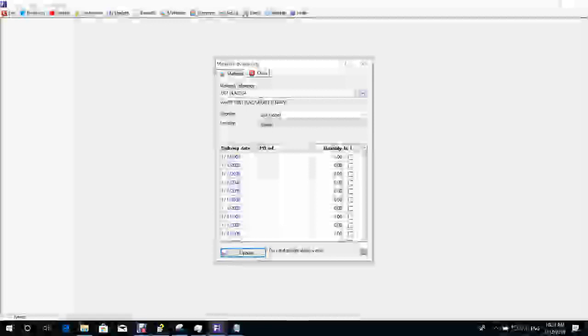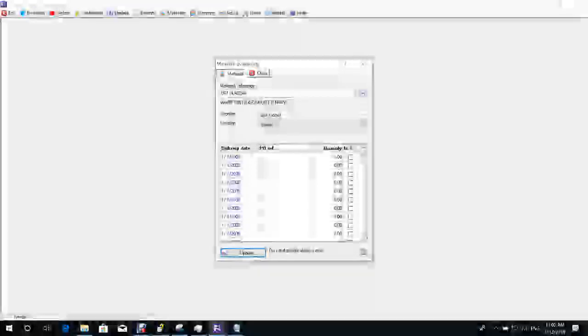Same time, yes. Because when I make a start time action plan for a PO, we ship after 90 days. I have no fabric and accessory in store. We'll buy the fabric and accessory and get it after 45 days.